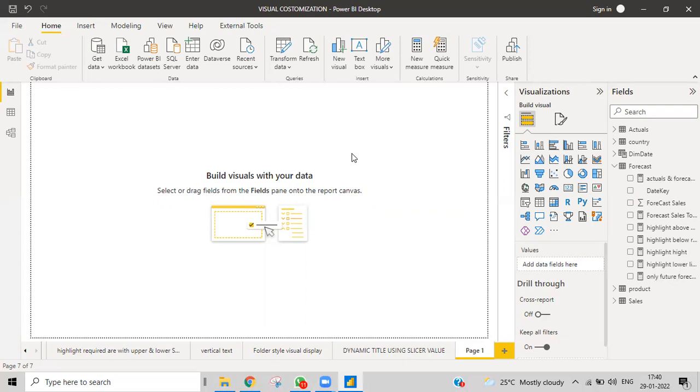So how do we do that? I'll tell you the logic, and then you can understand how we can do it. Simple thing: you have all the projects, and then start date and end date. You can take the minimum start date of all the projects as a benchmark. Then find the difference between that minimum date of all projects and each project's start date, how many days there are. That calculation will be the first measure that you need to drop in the stacked bar chart.